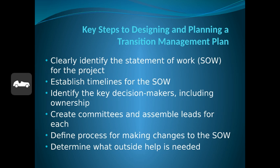Simply stated, if you want to think of building a house, you would not want to have the drywallers in there installing the drywall when the roof is not in place yet, because obviously any inclement weather is going to destroy that. I don't have an example on the screen to look at, but a responsibility matrix basically lists all the tasks on the left-hand side of the ledger, and on the top of the page it lists all the trades. And then as you go down, there are different boxes that are marked so that the trades know who is doing what, because it can be confusing, and I'll give you some examples.